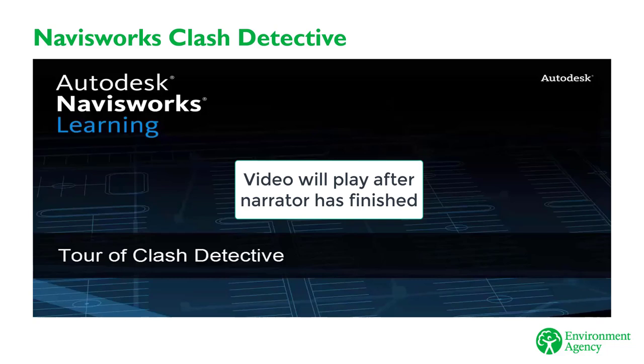In this video, Autodesk demonstrate how to conduct clash detection test using clash detective for identification and inspection of a federated model for issues. Upon completion of the clash detection test, Navisworks will provide a result of the clash test. This is where you can assign status of the condition of the clashes to individuals or groups for resolution. Finally, you will be able to also export the clash test results in a report that Navisworks will create for you to share with the project team.